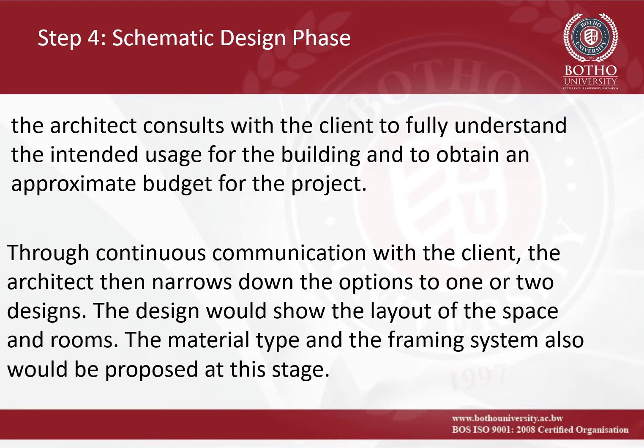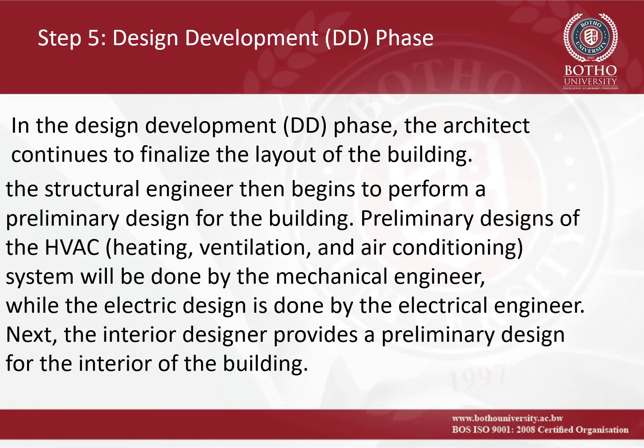The design would show the layout of the space and rooms. The material type and the framing system also would be proposed at this stage. The step 5 of the process is the design development phase. In this step, the architect continues to finalize the layout of the building.